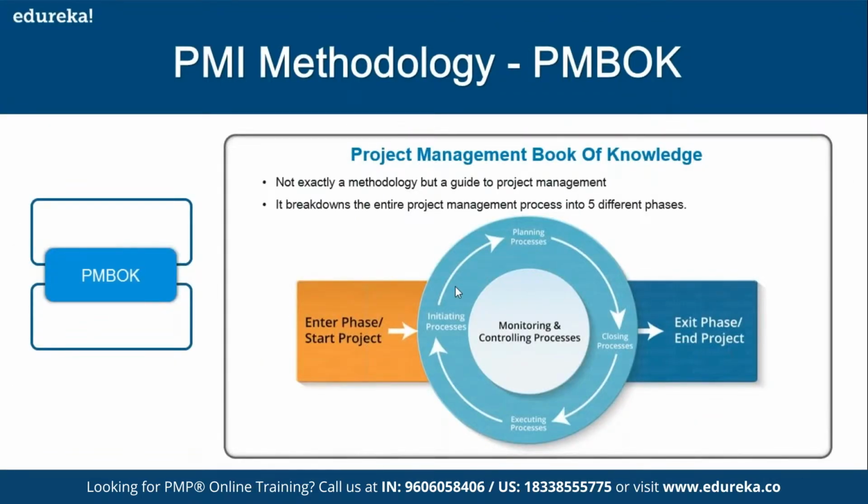Our approach is very structured, organized, so that you don't have any kind of surprises at a later point in time. We talk about initiation, we talk about planning, we talk about execution, we talk about monitoring and control, and we talk about closure. Monitoring and control is an activity that takes place throughout the complete life cycle, and hence it is an ongoing activity.